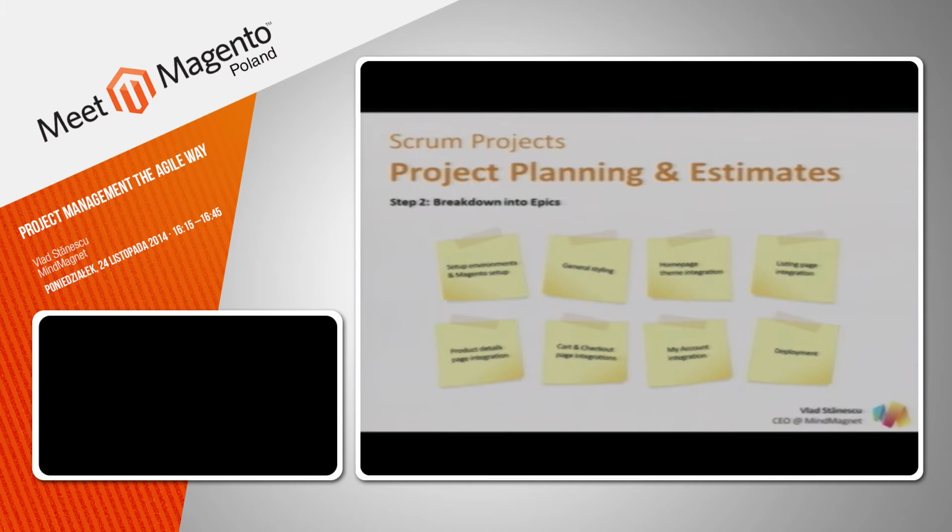After the client finds that acceptable, we break down the project into epics. These are a few examples done in a post-it design, like the traditional Kanban board. These are the epics we generally assign rough estimations on, which can be 1 week of development, 2 weeks of development, half a week of development. So they are very rough estimates, but in total give us a good idea of the timeline the project will have and the general budget it will end up being in.